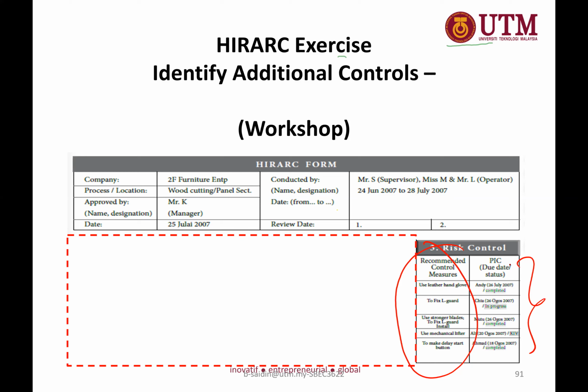In that exercise, I've seen they need to come out with the hierarchy form, not for the safety area itself, but for the whole project development phases. It could be a very lengthy form with many pages that cover almost everything during design stage, tendering stage, construction stage, and maintenance stage. You can imagine you can do the risk management exercise on almost anything.